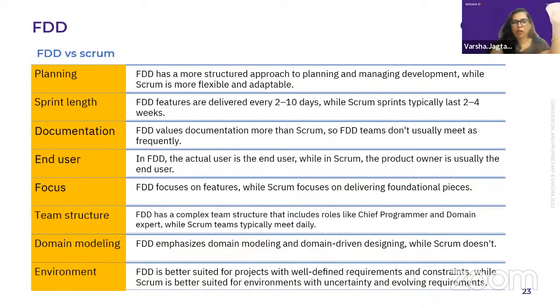And according to that, I would cover, like, authentication. Maybe a developer had already worked on this. He would deliver that in 3 or 4 days, or maybe if my next feature is more complex in nature, that might take 10 days. So that would come second. So according to that, I would decide my sprint length.